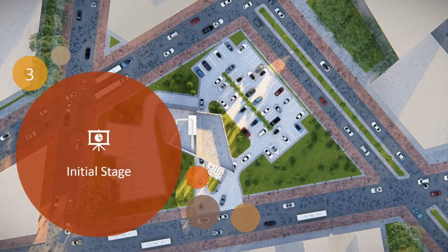The initial stage was mainly for establishing an open BIM workflow environment so that the delivery teams have clear instruction on how to execute all the project tasks. To do this, we first needed to develop an Exchange Information Requirement document, EIR. Then from that, we can develop the BIM Execution Plan, the BEP. On the next few slides, I'll be giving you an introduction to the EIR and objectives required by the client, as well as introduce the various communication and coordination platforms we used during the development of this asset.